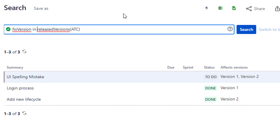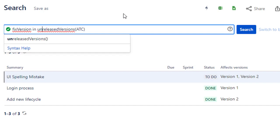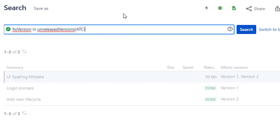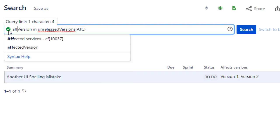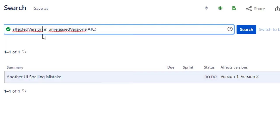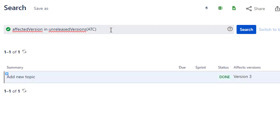If you want to find all unreleased issues where the fixed version is in unreleasedVersions for this project, use the unreleasedVersions function. This shows all issues that have fixes where the fix is marked but the version hasn't been released yet. Conversely, affected versions in unreleasedVersions shows issues where the affected version has not yet been released.